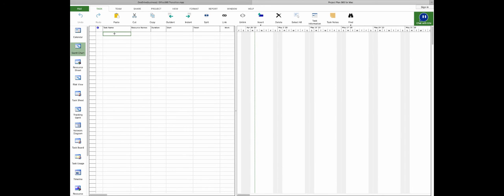We like to organize our project plans by identifying a first task here as a task that shows the entirety of the project, right? So in this case, we're going to do an Office 365 transition. So we'll go ahead and identify our high-level phases from here.